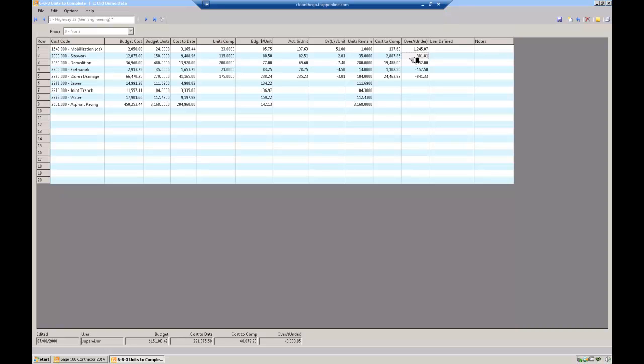or this week. And so this is great to use during a job to get kind of some feedback, but this is really important as the job is completed, and especially on this line item, that the project manager and the estimator kind of sit down and figure out what happened here, because the estimator thought it was going to cost $86 and it wound up costing us $138. And so no finger pointing, not one person was right or one person was wrong, but something changed from the day we bid the job to the day we completed the job.